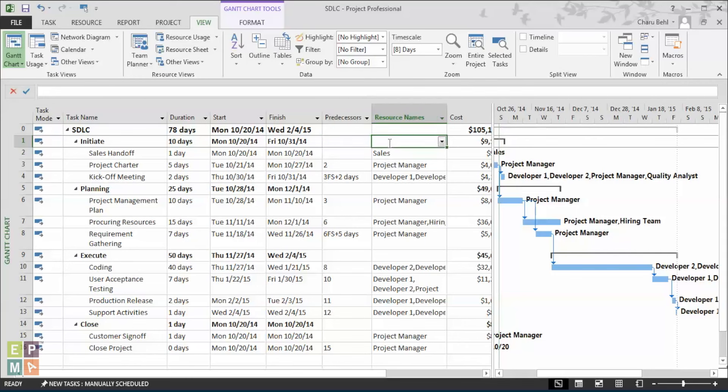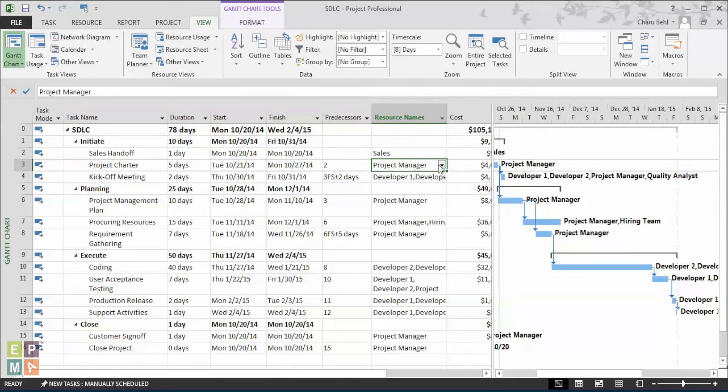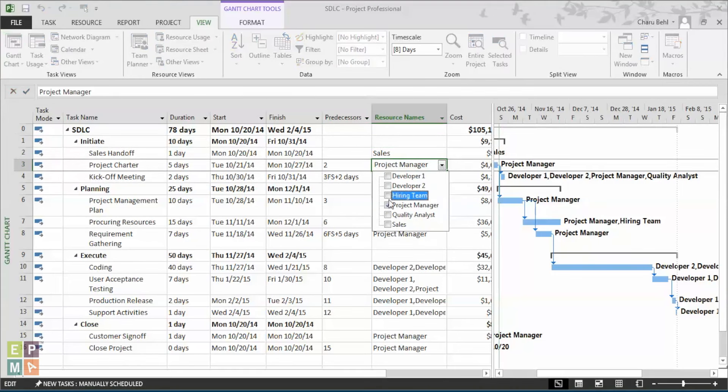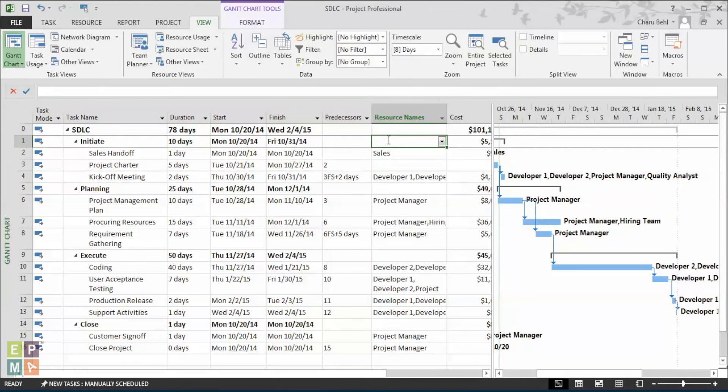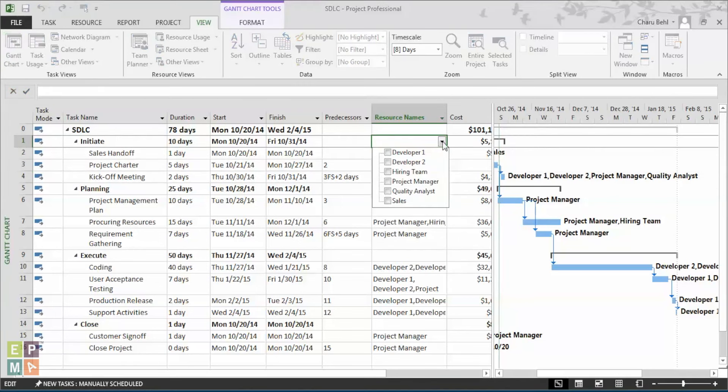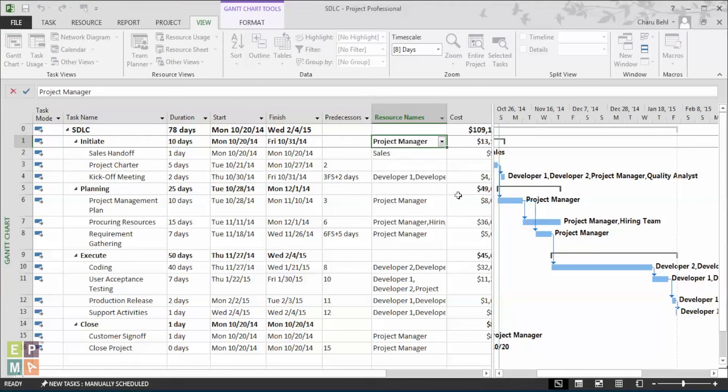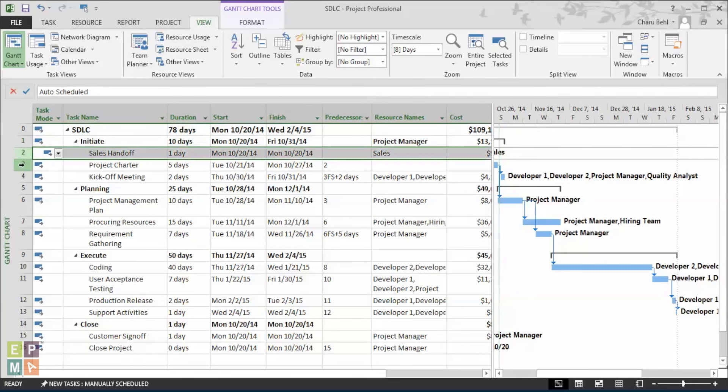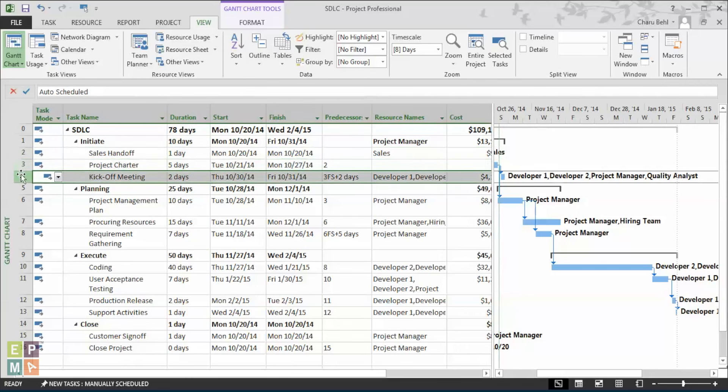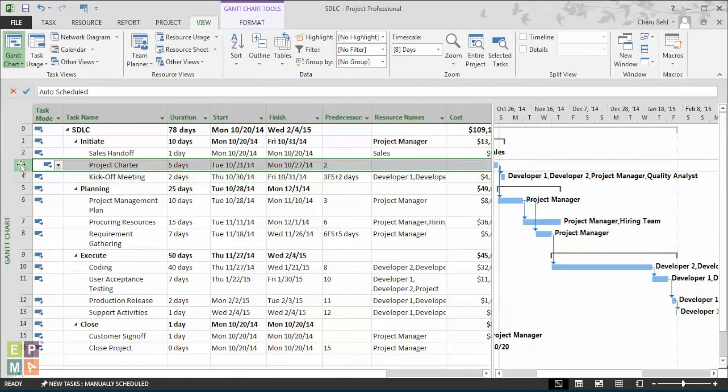I will give you a quick demo of why you don't do that. Now, for example, it is very tempting for a scheduler to assign project manager to the initiate phase, thinking that the project manager will be involved in this phase. But how Microsoft project calculates is that the project manager is involved within all the subtasks under that phase.